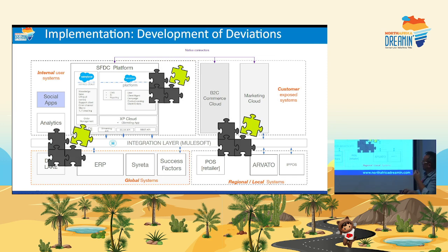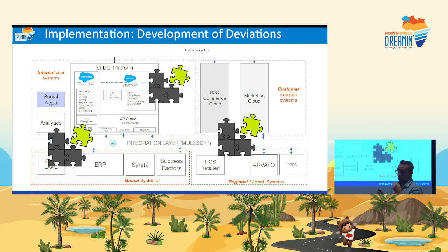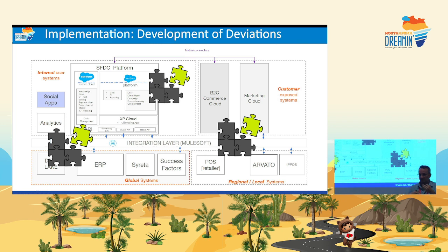And when it comes to the deviations, you've done all your learning curve and you have something to work on top of. We can think of the deviations as plugins that you install on top of your blueprint. So typically, it would take less time to build a plugin, but don't underestimate that, because sometimes when we work on edge cases, we end up spending a very long time to develop something that is nothing compared to the rest of the project.